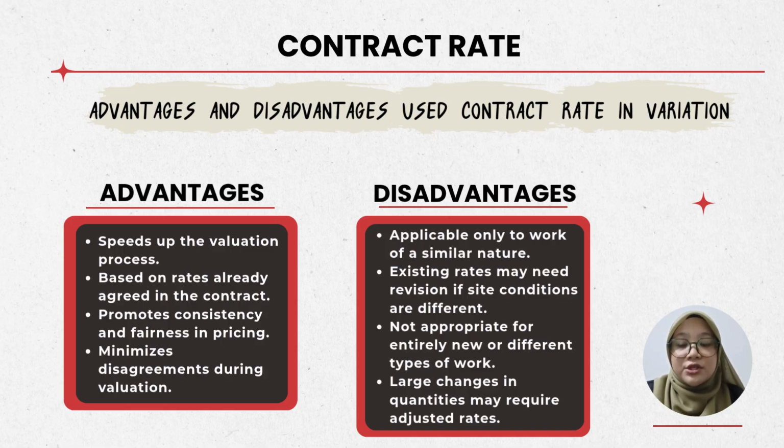Another disadvantage is that contract rates are not entirely suitable for a new type of work that is not included in the original contract. In such cases, a new rate or fair rate needs to be established. Lastly, significant changes in the quantity of work may also require the contract rate to be revised, as the original rate may no longer reflect the actual cost of construction.